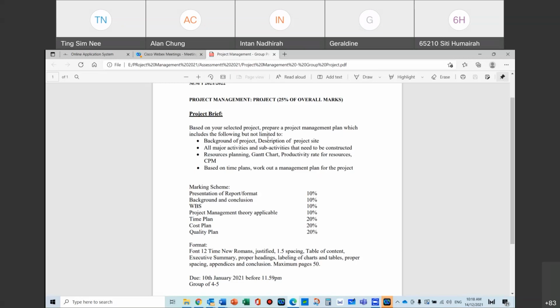With layer 3, and then you use production rate to do your duration calculation. And then after that, you want to describe a little bit on the interdependency, that's fine as well. Or if you want to do a network to show the interdependency, it is very much welcome, but you don't have to do a critical path analysis.